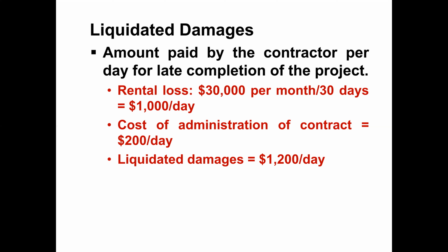So really, liquidity damages are whatever return is expected from that project per day. This is the base: when the consultant writes the documents, they put in those documents that for this project liquidity damages will be this much per day.